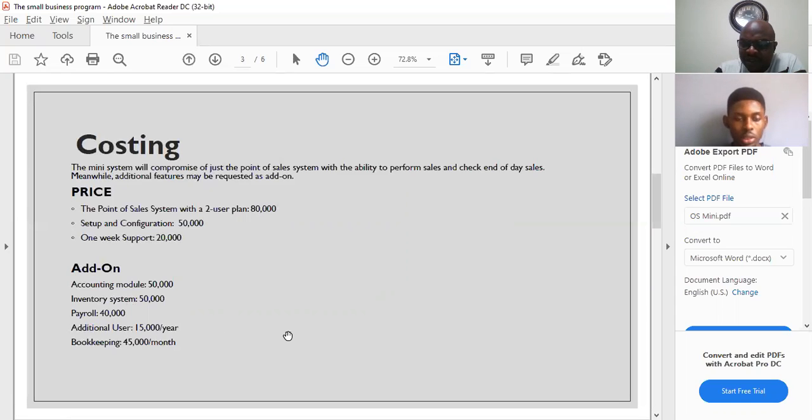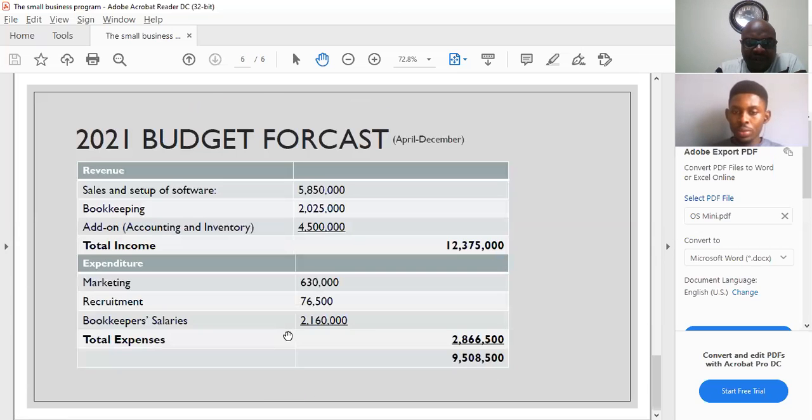I understand. So what they're being paid will be the cost. What the client is paying us will now be the rate. Okay. So we can now figure out how much we are making on each project. So bottom line is basically this.